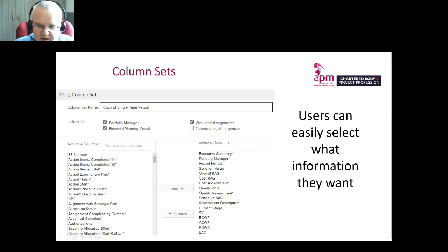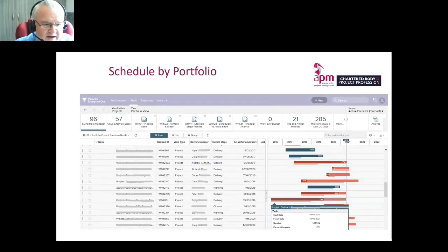So one of the big benefits was the fact that we could put schedules against some of the tasks. All the projects had schedules, but they were schedules in P6. But when we come down to the tasks and the minor projects, often, like I said, they were just represented as one bar. There is a high-level overview, so you can see all projects and tasks as those bars, and you can see here straight away. And again, this is test data; it's not real data. We don't have so many projects which are behind schedule, but you can see the progress of each of the projects quite easily compared to the baseline. You can see where we're up to at a particular point in time as well.